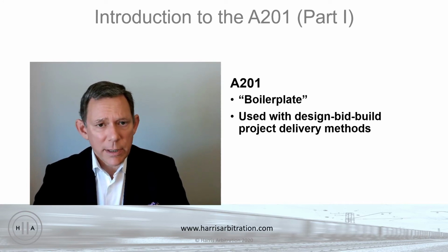And the A201 has a lot of what we would think of as legal terms as opposed to commercial terms. Legal terms in the sense that they tend not to change so much from project to project, unlike the commercial terms where there's a different schedule, different price, etc. for each project. The commercial terms are in the A101, the legal terms in the A201.